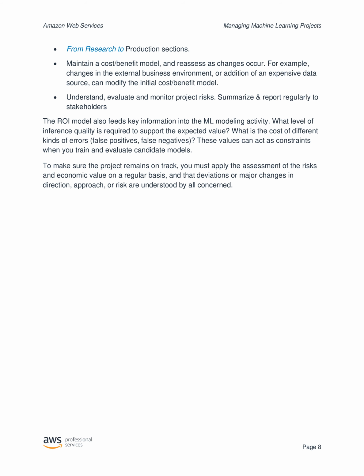The ROI model also feeds key information into the ML modeling activity. What level of inference quality is required to support the expected value? What is the cost of different kinds of errors, false positives, false negatives? These values can act as constraints when you train and evaluate candidate models. To make sure the project remains on track, you must apply the assessment of the risks and economic value on a regular basis, and that deviations or major changes in direction, approach, or risk are understood by all concerned.